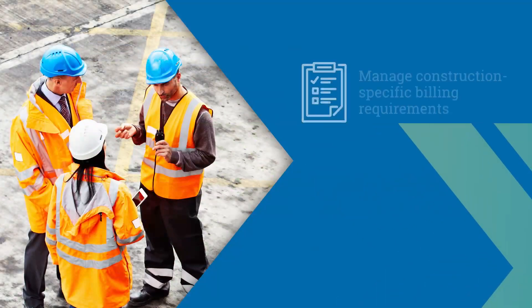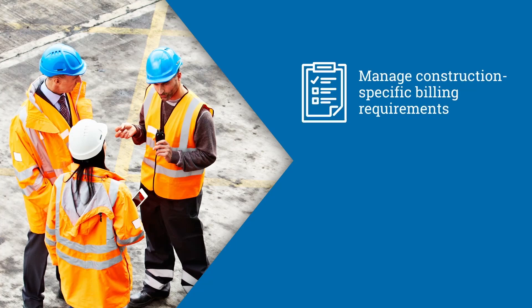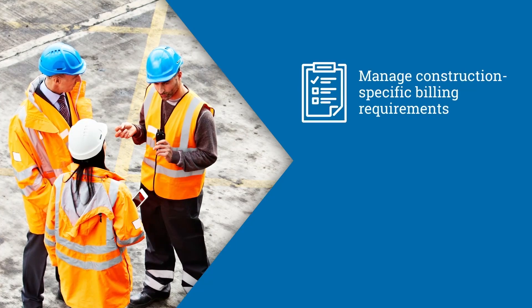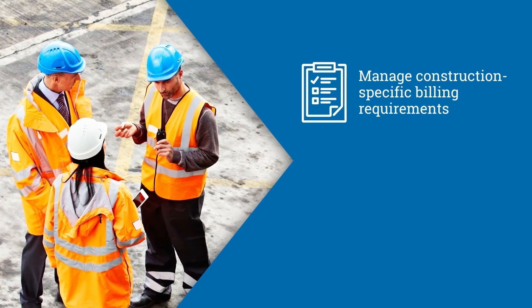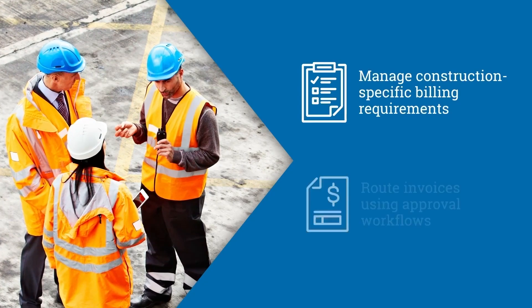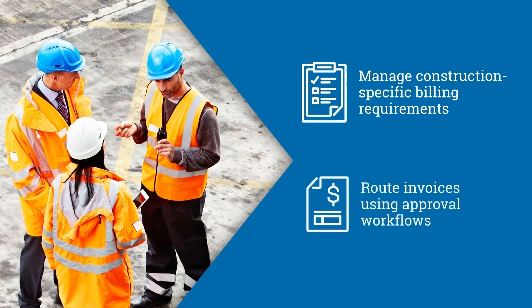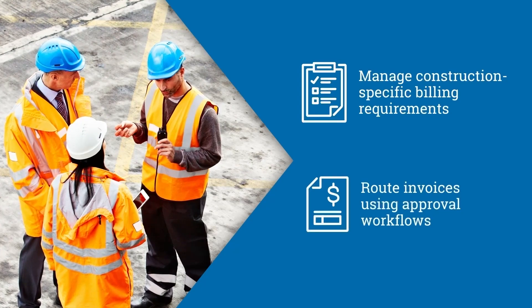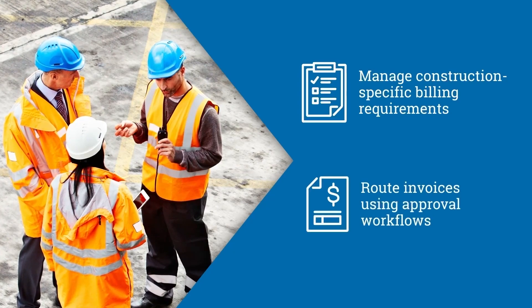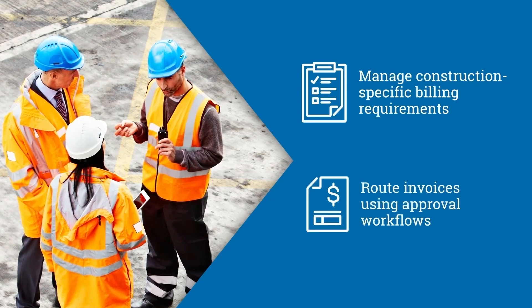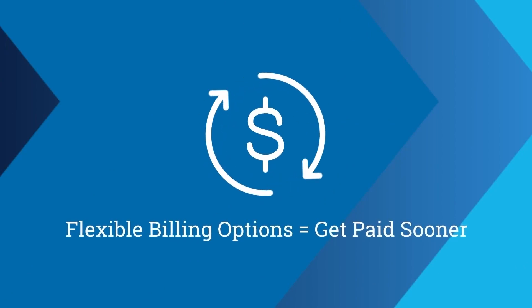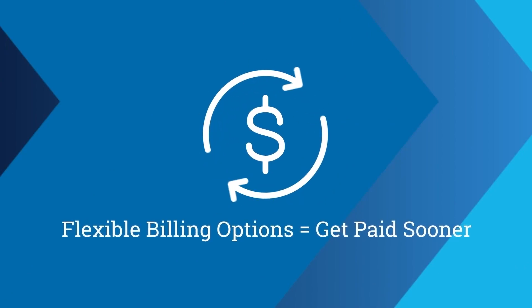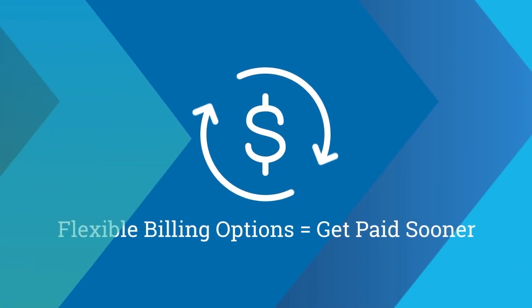You can even manage your construction-specific billing requirements, such as AIA billing, and route accounts payable invoices using approval workflows. You can utilize flexible billing and payment options to get paid sooner.